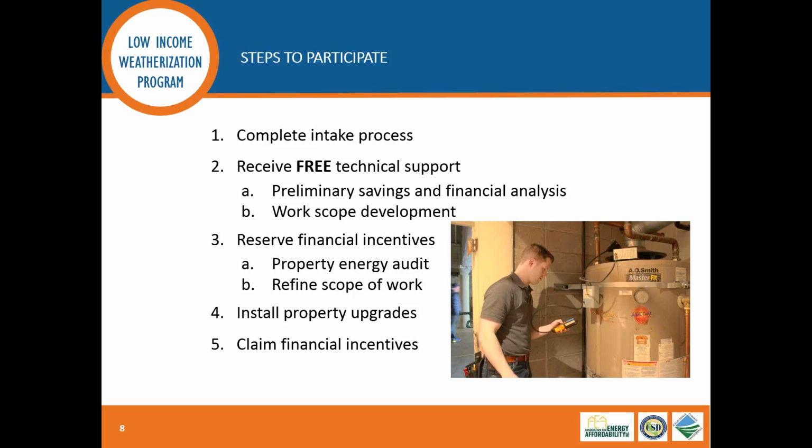So reserving financial incentives happens after the audit's completed and we've all agreed on the scope of work. And it's been refined and there are clear specifications in place. And at that time, we encourage the owner to go out and request bids from contractors. And it's at that time that we would provide them with the list of participating contractors, such as yourselves who are attending this webinar today.